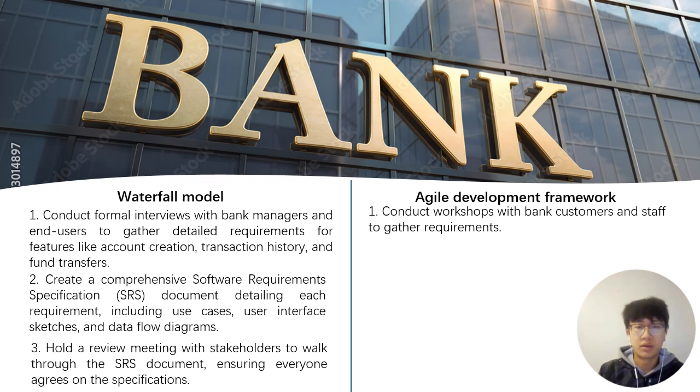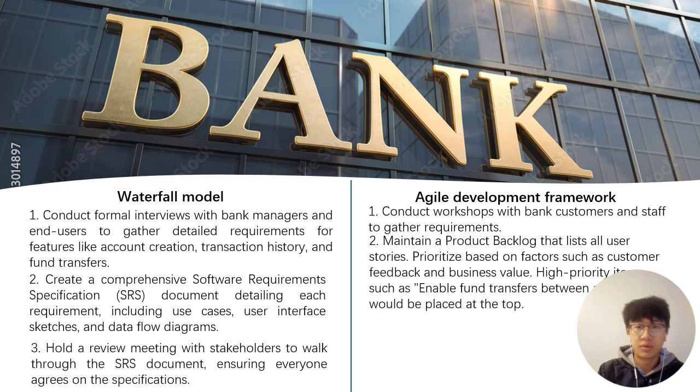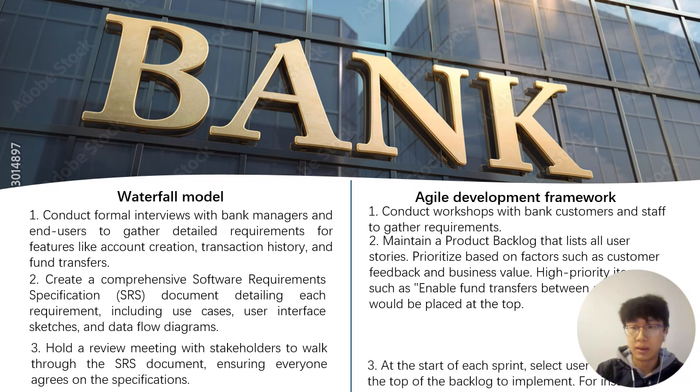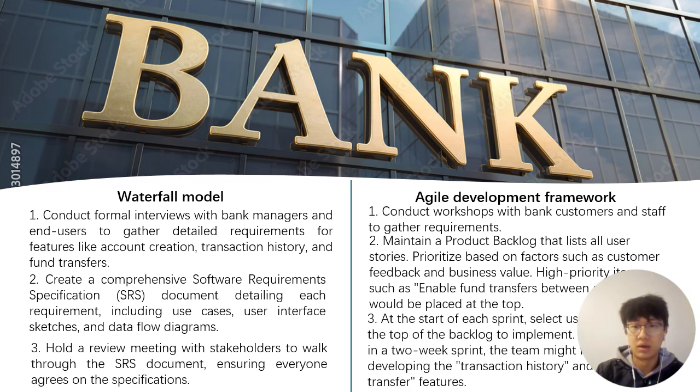We can maintain a product backlog that lists all the user stories, prioritized based on factors such as customer feedback and business value. High priority stories like enabling fund transfer between people would be placed at the top.